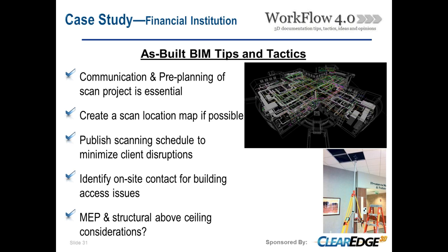We like to create a scan location map if possible. That helps with the proposal preparation and costing for the project, but it also is a nice tool to give to the client so they know where you're going to be in your facility. That's pretty helpful. And along with that, publish a scanning schedule. Again, that's really to minimize any client disruptions.